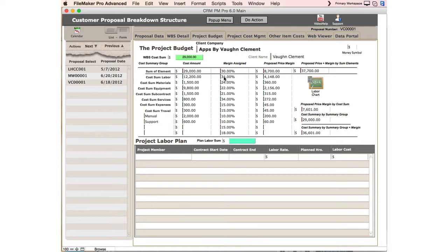Okay, what I mean by that is you can change the percentage and load it separately for all the elements that you put in your WBS. And that would be the sums here, and the percentages here will end up being the total here, and then whatever the margin is, that will be the summary with the margin and profit with G&A and everything. So you can see that that's the way you build your numbers. Cost with the margin gives you the price for the proposal.